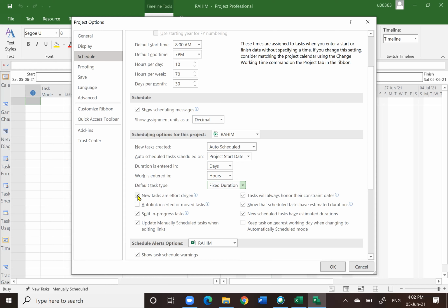First scenario, fixed duration. Let's say piling. I fix the duration for piling as 10 days. Then I figure out, oh, if I need to complete in 10 days, I need 2 piling rigs. Okay, fair enough. That's what we call fixed duration. We fix the duration and then we figure out how many resources to match our duration.